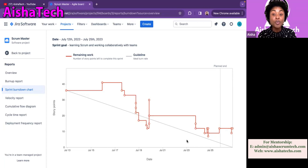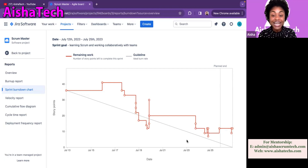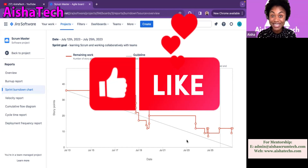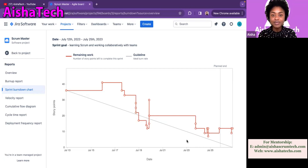Overall, this team is actually a very good team with high potential. If I'm working with this team, I would first have to understand their mode of planning. If halfway through the sprint they are able to close almost half of their tags, the question I will ask as a Scrum Master is: are they taking enough work? Do they even understand estimation? Maybe they are overestimating, and then realizing the work isn't as complex as they thought. I would definitely have a sync-up session to have a conversation around the workload of the sprint, and educate them on how we can better plan as a team.